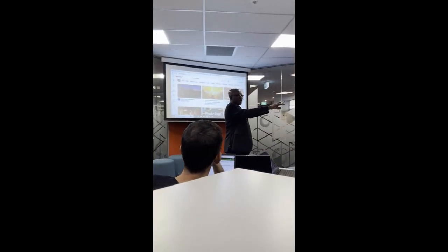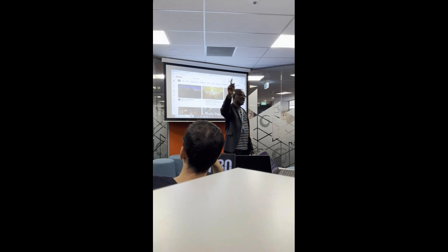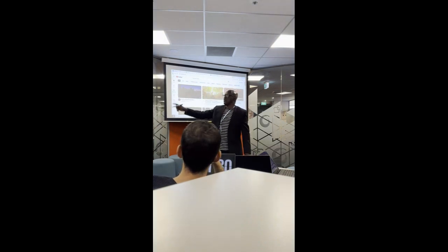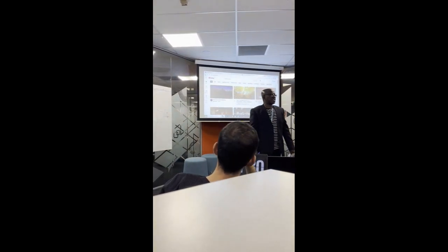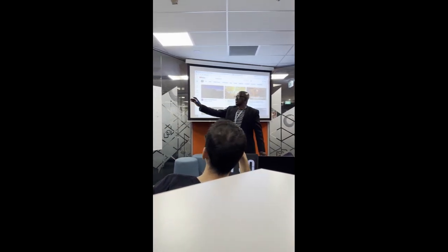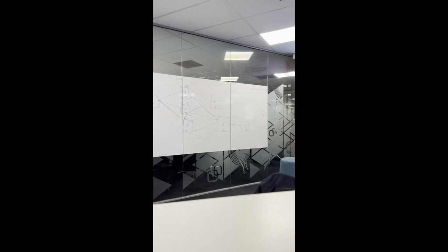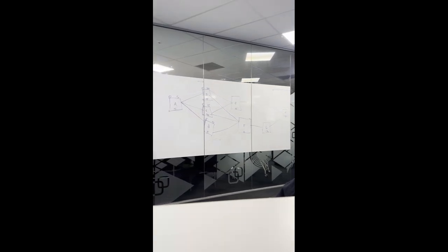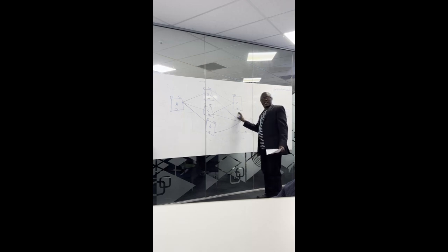I get your explanation, but I want you to explain in full, and that full will include you cannot start until that 20 days, because even if you have completed activity C, you cannot start activity E until that 20 days of activity B is completed. Because for E to start, it has to take into consideration these two activities. And if one finishes earlier and the second one has not finished, it has to wait for it. So we say 20, that's the starting time here, plus 15 days for this, will be 35, right?